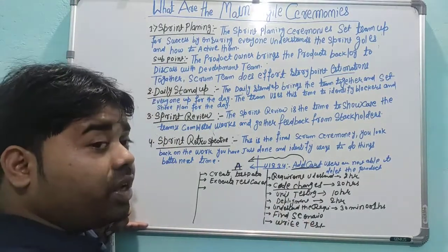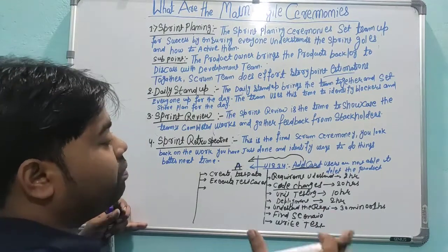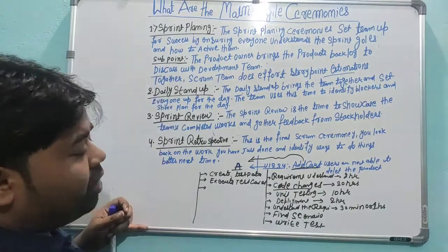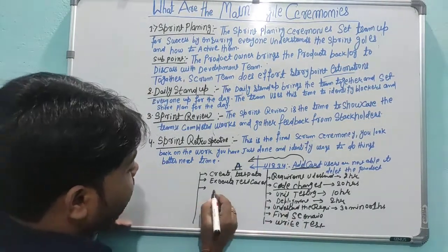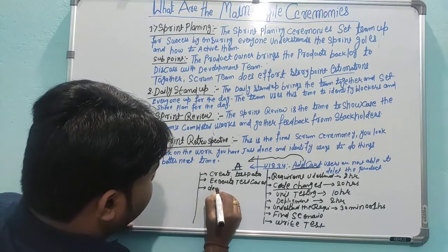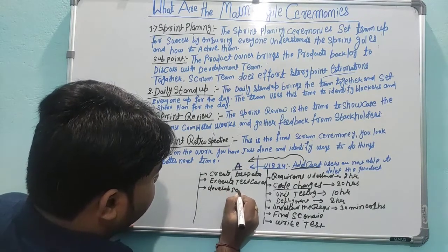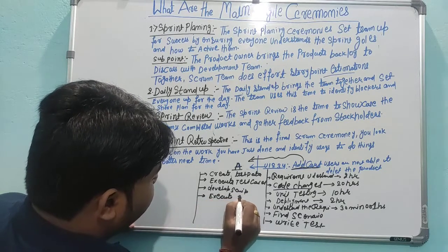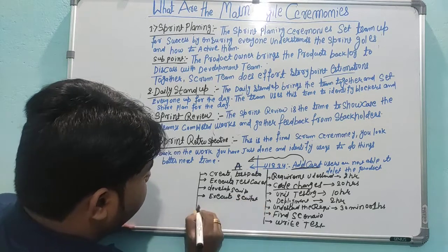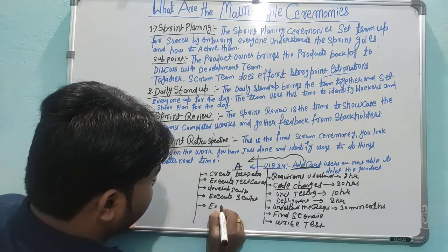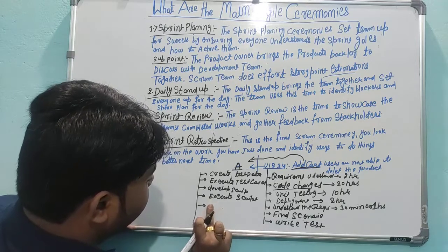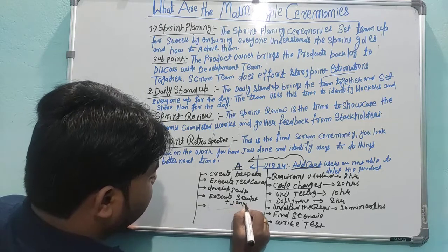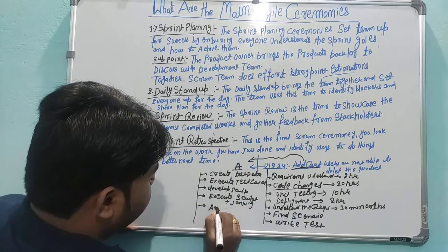It depends upon how we are going to do the testing. If you are doing automation in the same sprint, or maybe we have different resources for the automation, or I am considering that I am doing everything. So here: develop a script, then execute the script. In script execution, you are executing locally plus Jenkins. Analyze the report.